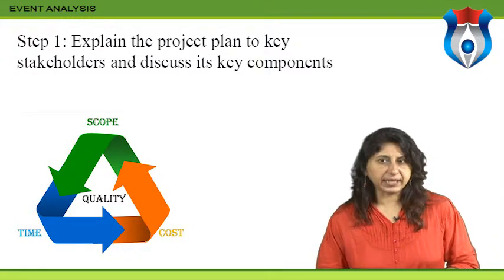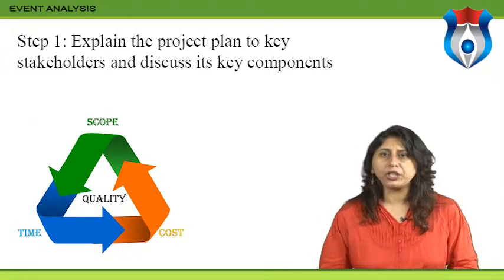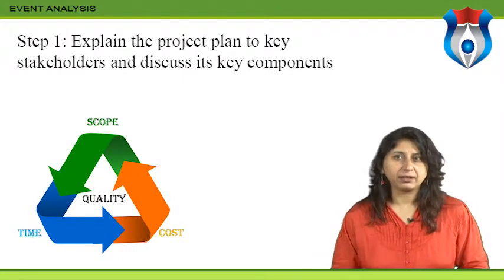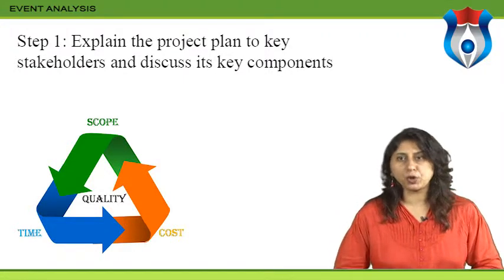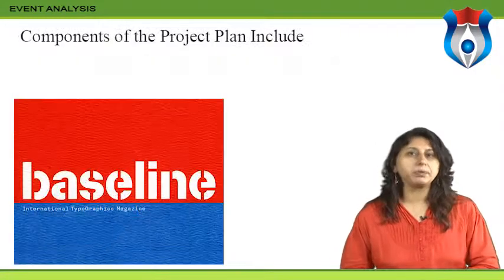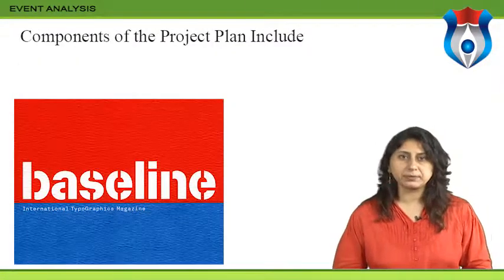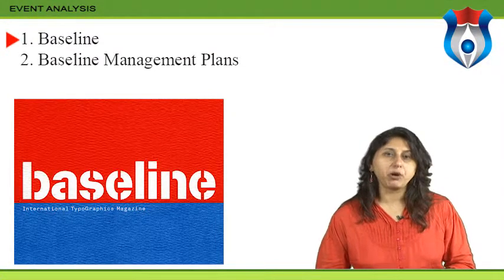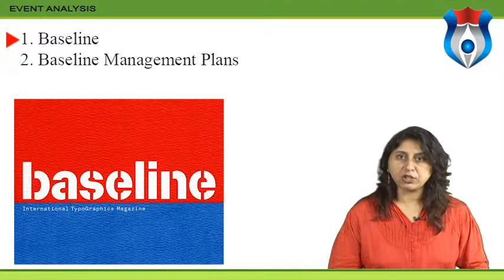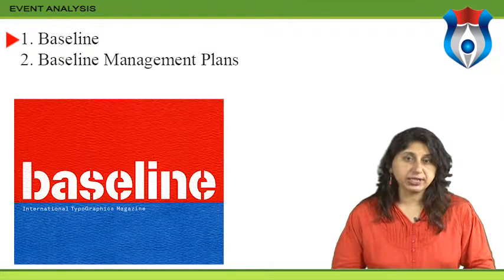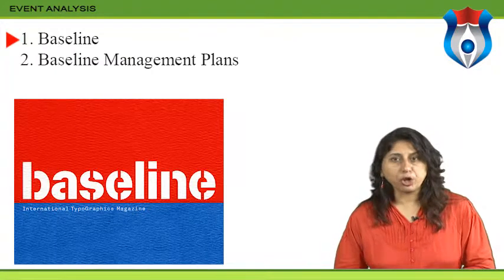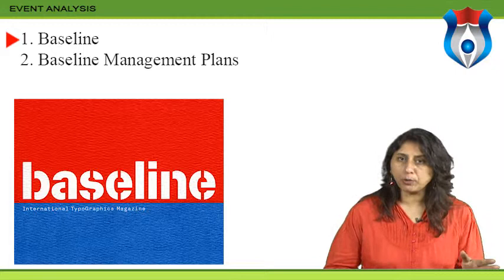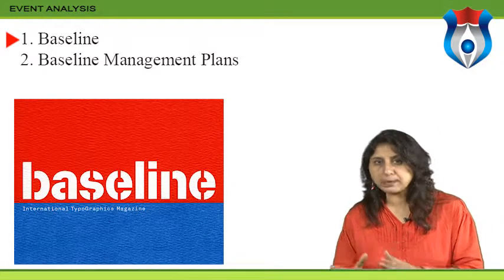Just as a driver may encounter road construction or new routes to the final destination, the project manager may need to correct the project course as well. Components of the project plan include baselines. Baselines are sometimes called performance measures because the performance of the entire project is measured against them. They are the project's three approved starting points and include the scope, schedule, and cost baselines.